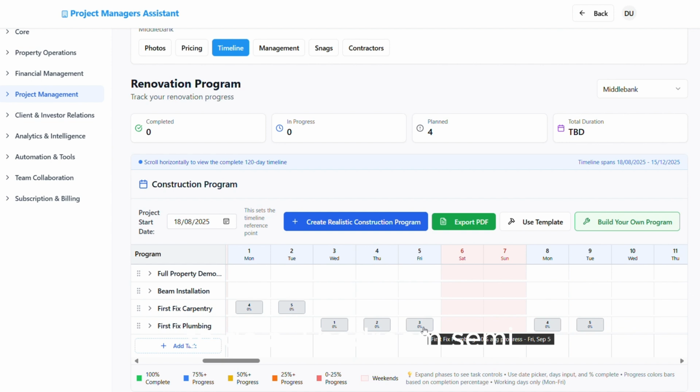For a 3-bedroom semi, a plumbing team should easily get all the plumbing work done in 5 days. It might even be less than that, but 5 days should be sufficient for them. That's all the carcassing, all the hot and cold water pipes, undergrounds, on the floors, in walls, coming out where they need to be in each room, in your kitchens, bathrooms, en-suites, downstairs toilets, and all your radiator stabs coming through in the right location. All this needs to be done at this point.